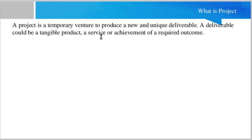Two components are very important and must be present in any project. First, it should be temporary — temporary means it will finish at some point; it should not be an ongoing activity. Second, it is always unique — unique means whatever the scope, complexity, or scenario, it is always a unique thing. So: temporary means it will start at some time and finish at some time, and unique means you are doing it for the first time.